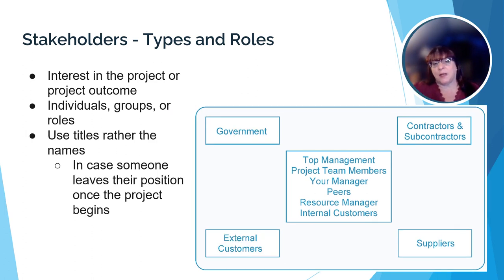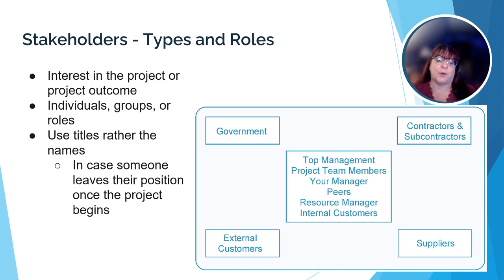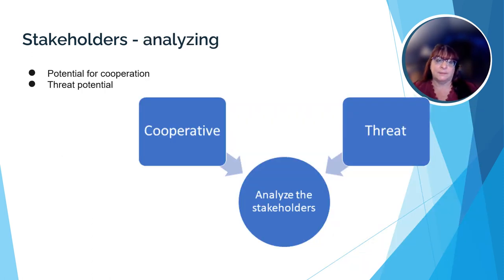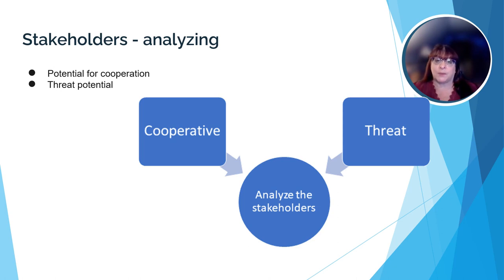When identifying the stakeholders, try to use the title of the stakeholder rather than the name of the individual. Just in case the individual leaves their role, there isn't a need to update the stakeholder list and all the relevant information with the new person's name, as long as the duties assigned to the title don't change. While we're preparing the stakeholder list, we need to analyze what they will bring to the project. We identify stakeholders who are available to help with different aspects of the project, such as the company financial officer or human resource manager.